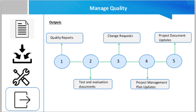Project document updates include the issue log — as a result of audits done as part of the quality assurance process, new issues may be raised and recorded in the issue log. Information is added to the lessons learned register on challenges encountered during the quality management process and approaches that worked well for managing quality. New risks identified during this process are recorded in the risk register to be managed using the risk management process.